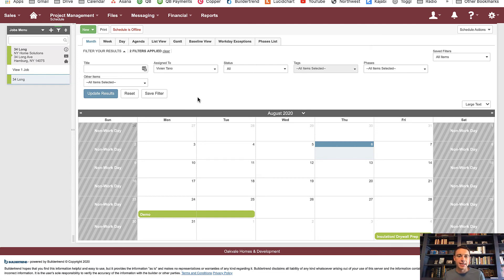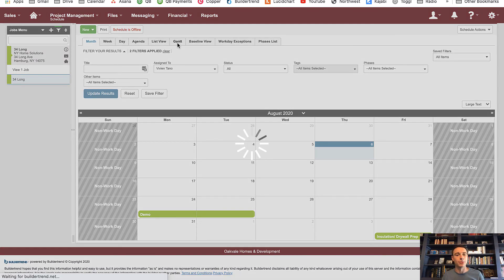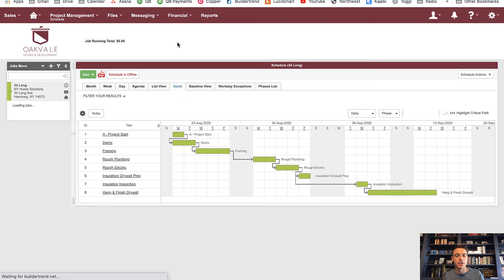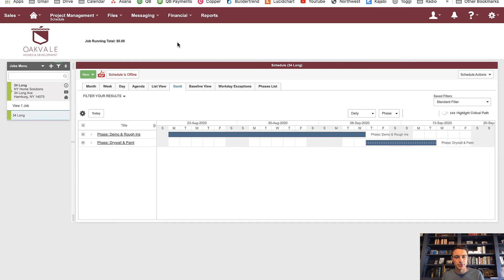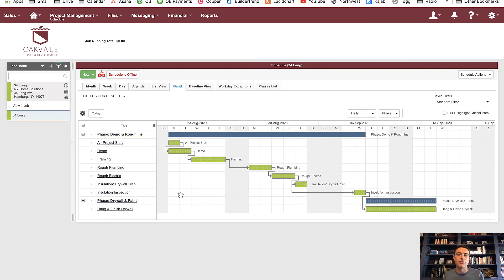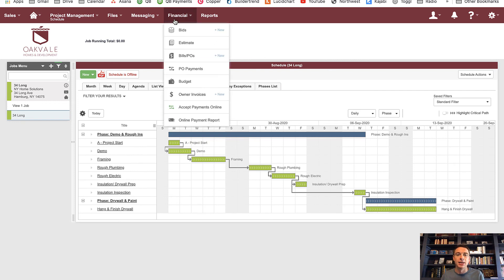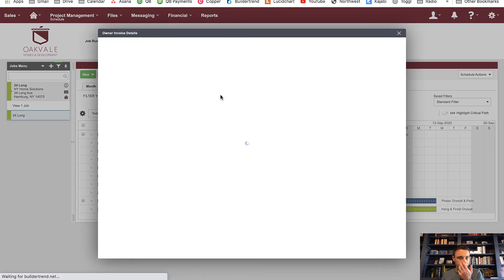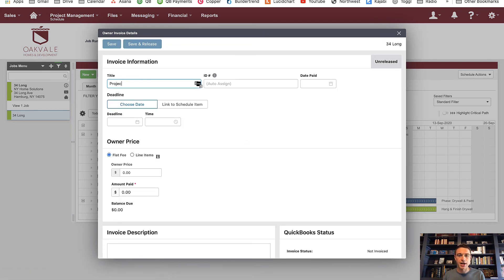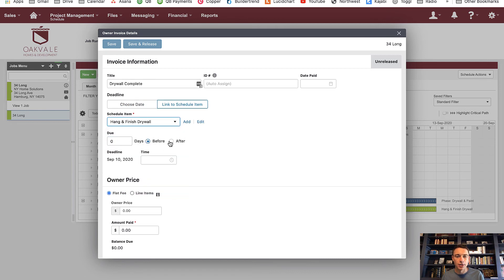The schedule is the anchor of any BuilderTrend setup. It's the biggest quick win within BuilderTrend — super robust, can do pretty much anything you need. Every project needs a schedule. This is a core function, and by 'anchor' I mean we can link other aspects of the project to the schedule. For example, if the owner owes us an invoice when drywall is complete, right here I can set the invoice deadline to when hang and finish drywall is complete — instead of just a random date.